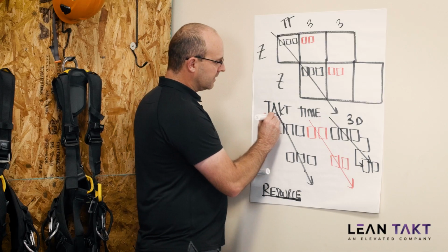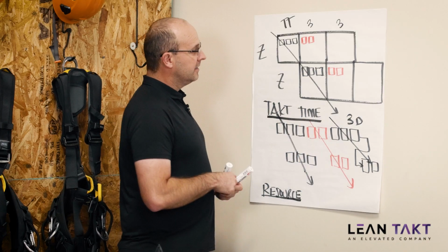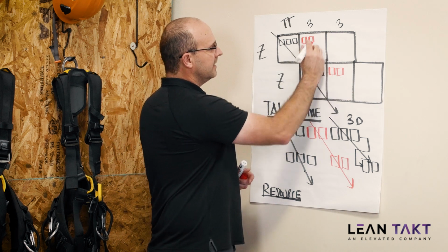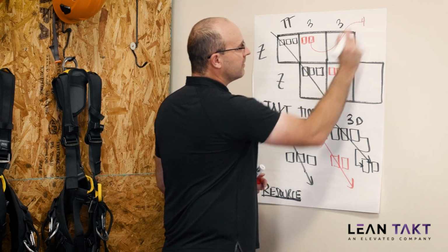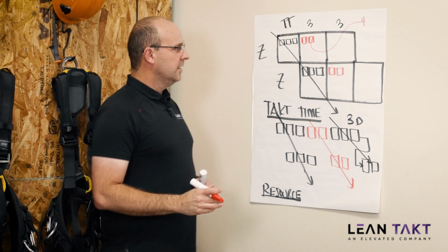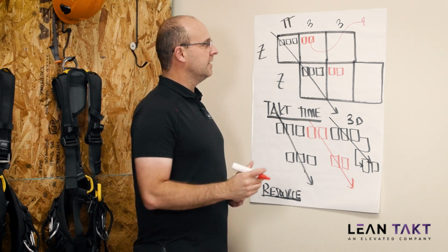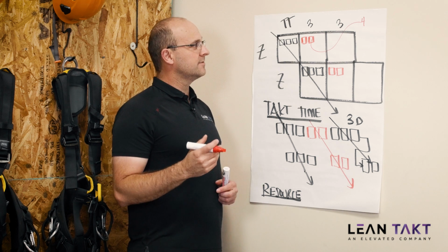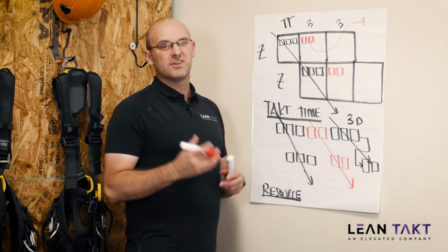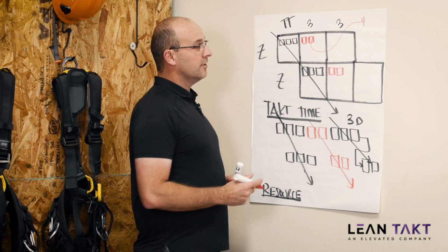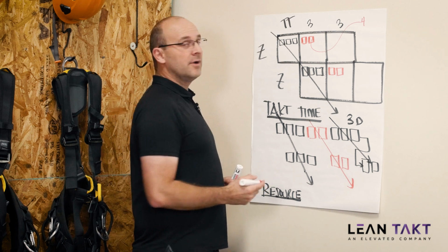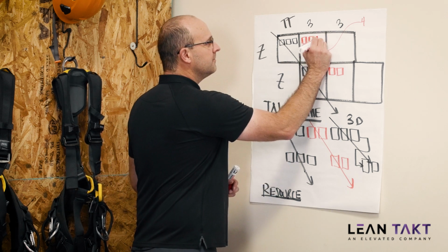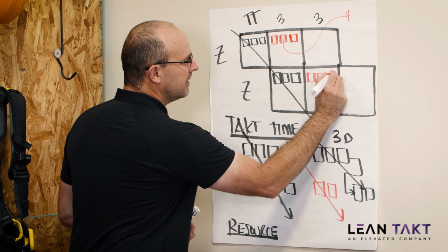But if you do want to keep it takt time based, then one of the things that you could do is crew this trade down. So they had a 4-person crew. You could talk to the trade partner and say, hey, what if we went down to a 3-person crew, right? 2 people up on lifts, 1 person feeding materials, as long as it's not too heavy. Is this possible? And you might find out, yeah, okay, we could go to a 3 or a 2-person crew. And then that would extend their duration.